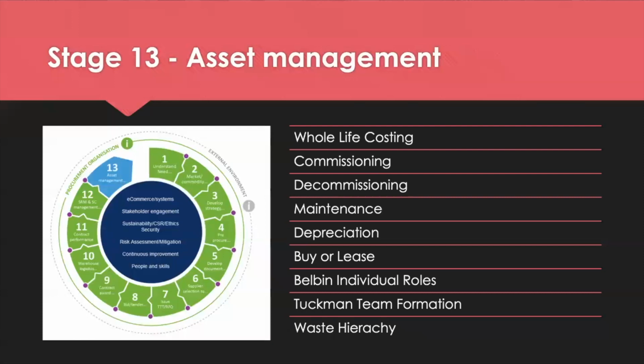So the sorts of things I'd expect you to talk about at stage 13 is whole life costing, focusing not just on the purchase price, but all the costs that you will have to pay to own this asset for the period of time. Think about commissioning, which includes training, installation, connecting up to water, electricity, gas, even internet connectivity.